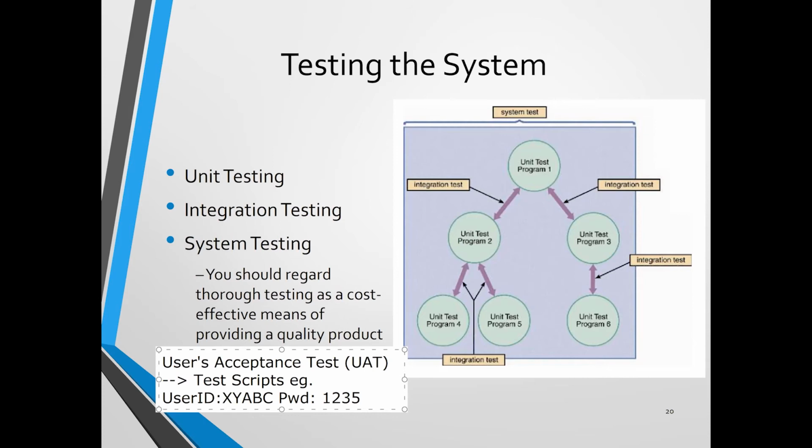So you may just tell the users in the test script, okay, do you see 1,000? If the user says no, I see 1,200, okay, for the test script here it has some error. The system analyst will have to send feedback to the programmers and say that, okay, for the order entry screen, it caused an error because right now it calculates the total amount wrongly. Normally a user acceptance test takes maybe 1 or 2 days at least, because everything must be tested thoroughly.